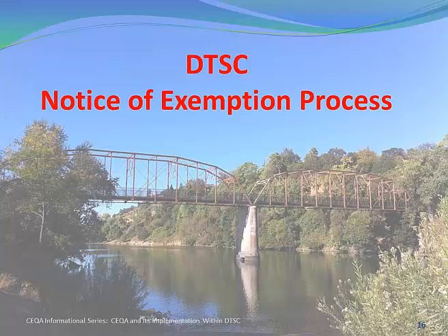If we did a negative declaration or an EIR or some other agency did one before, we still need to analyze, is this really the exact same facility that got permitted back then? And then we also need to look at, have other circumstances changed? Maybe it's the exact same set of waste streams and volumes and everything else, but maybe the neighborhood has changed. Maybe the laws have changed. Maybe the regulations have changed. We need to look at all of that, document it, and then figure out where we go from there.